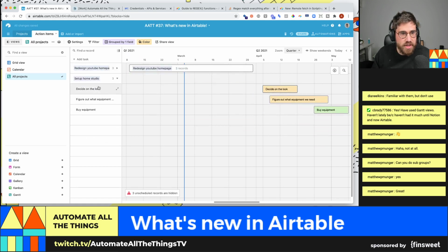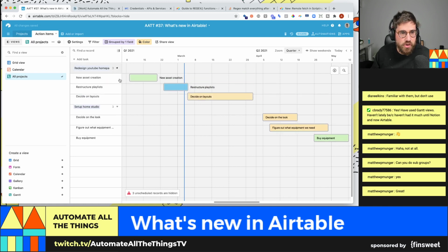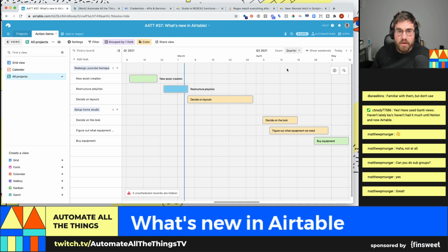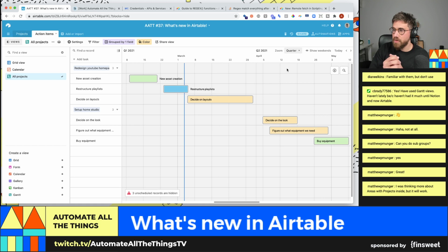Okay, so we have our first project, our second project. There's a few more things I want to show you for Gantt. So first is this question of dependency. So for me to be able to restructure playlist, I need to first, so for me to decide on layouts, I need to restructure the playlists first, right?